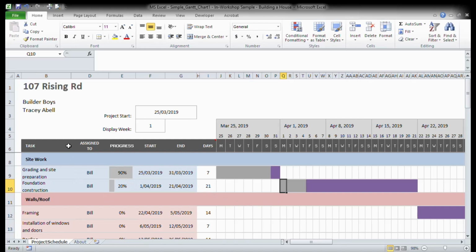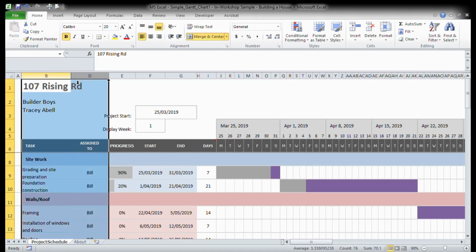Alright, so in addition to that, when you're working on projects, you tend to have some sort of numbering system in place for each task. So if you're assigning work to someone, you assign them tasks 3.4 and 3.5, or 4.1 to 4.9, rather than saying, well, you've got a frame, you've got to install the windows and the doors, and you've got to do this and that and the other. So it's an easy method of communication. And that is often called work breakdown structure numbering or project numbering.